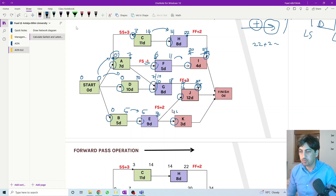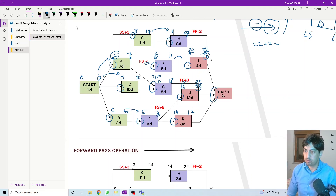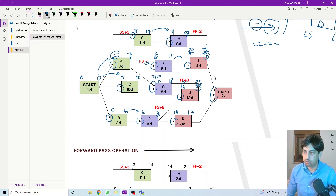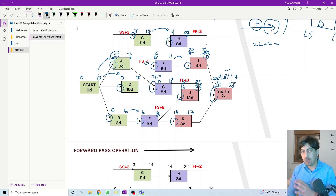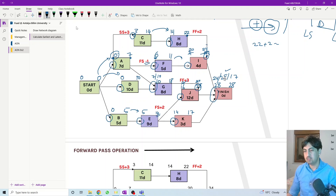For activity K we have only one option, so we transfer fourteen directly — fourteen plus three equals seventeen. At the end node we have three options coming in — finish-to-start from twenty-four, twenty-eight, and seventeen. Among these three we select the highest: twenty-eight. Twenty-eight plus zero equals twenty-eight. This is how we calculate the early time — moving forward, always adding, looking at arrowheads, calculating all options and selecting the highest. In the following session we will calculate the latest time moving backwards.